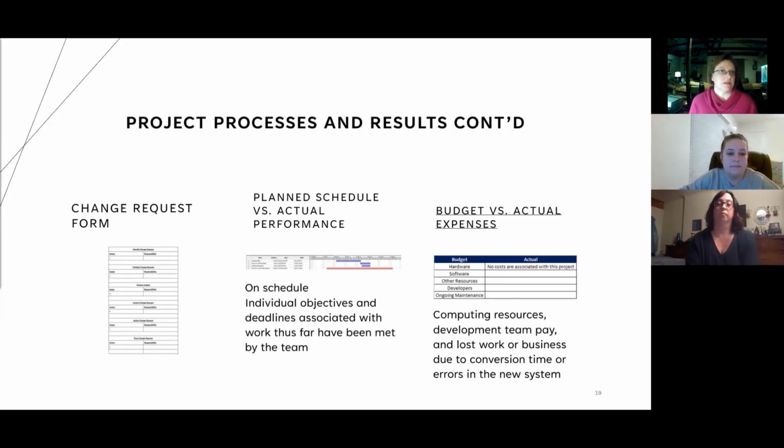On this slide, you see the change request form, the current project schedule, and the budget versus actual expenses. On the change request form, you can identify the change request, validate it, analyze the impact, control the change request, take action on it, or close the change request. The change request form will belong to the development team and be maintained throughout the entire change request, whether it is completed or denied.